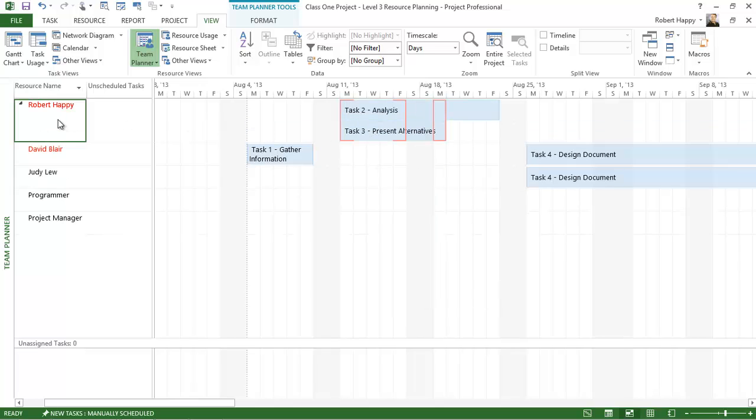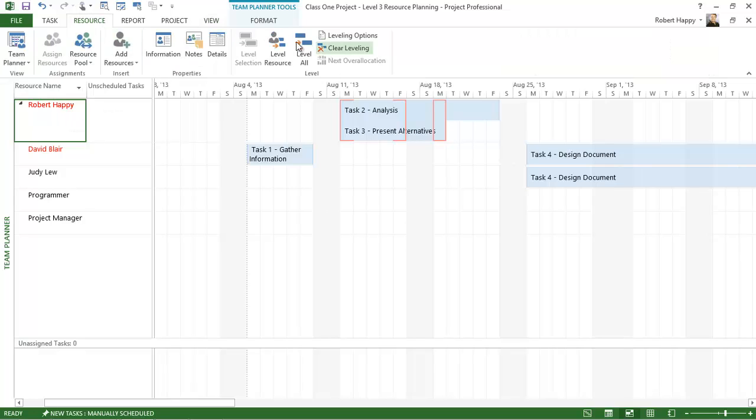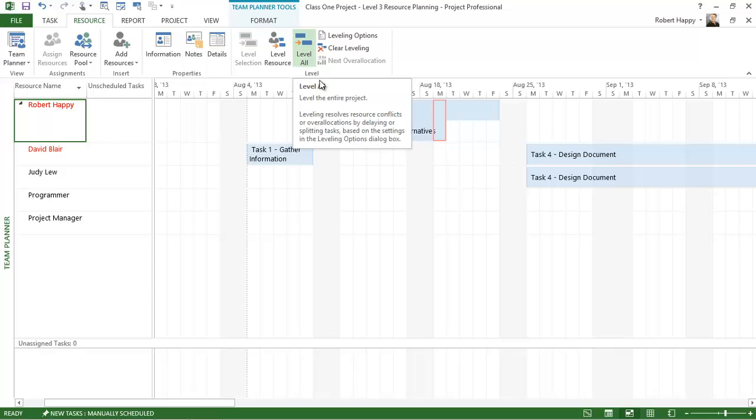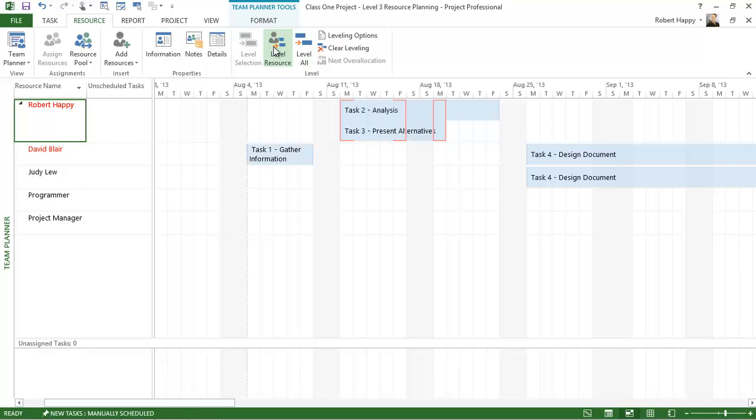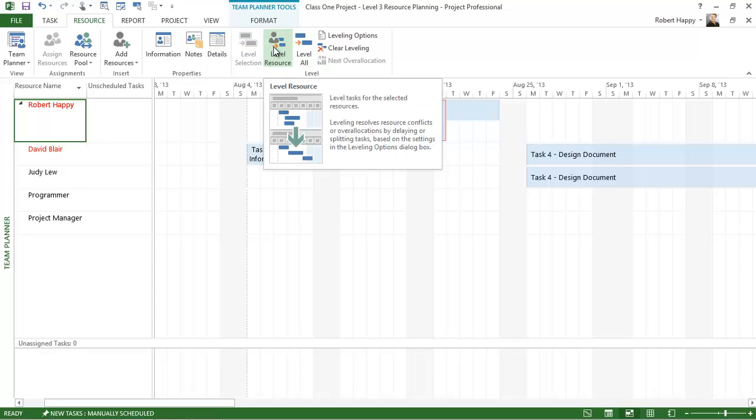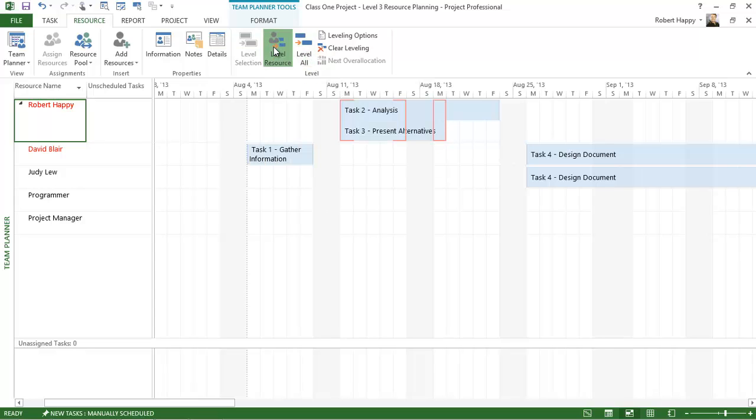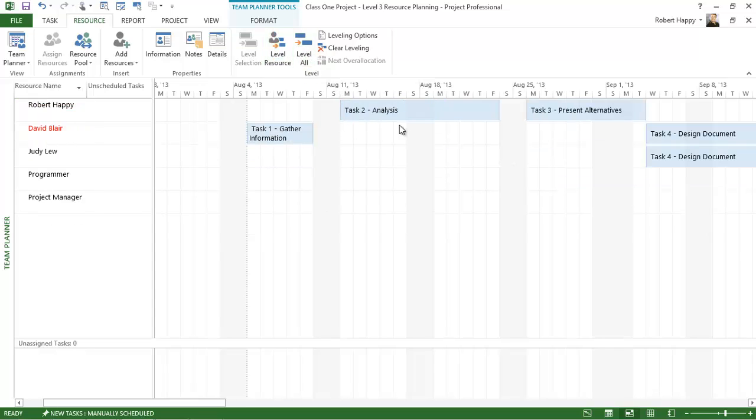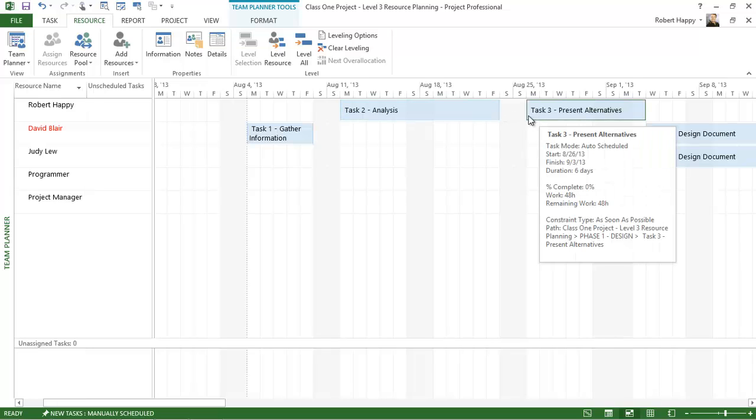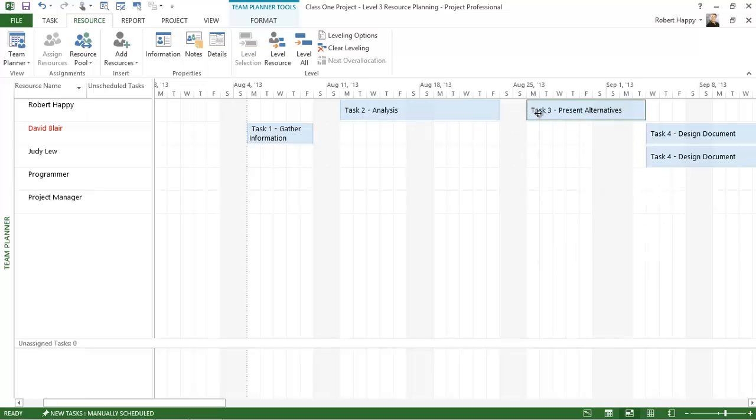I can also click on the resource here, and under the resource tab you'll see that we have this leveling area. Instead of leveling the entire project, I can just level that individual resource, and it will solve the problem for me automatically and just push out that task. You can see that task 3 got pushed out.